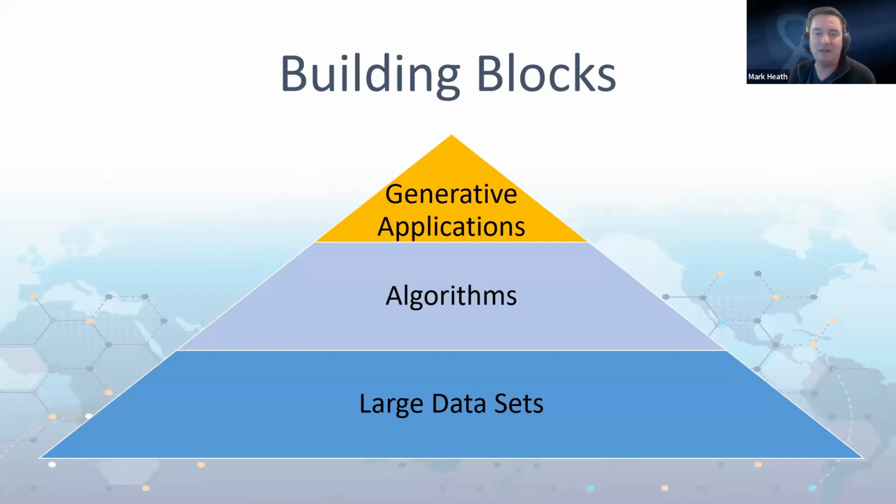The red, amber, green statusing in UniPhi is internal and external metrics around a project's success, but they're not controlled by the end user. They're rules-based algorithms in UniPhi where the computer is analyzing the data across a series of metrics. Each individual metric has its own red, amber, green statusing based on the rules, and then that aggregates up to an overall rule for the project. And so I'd say that is a machine learning based methodology.